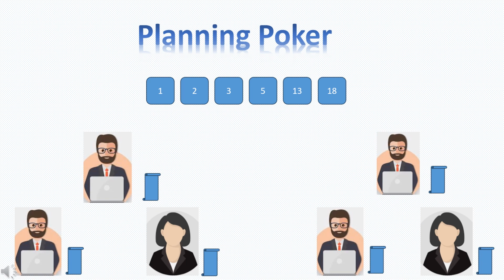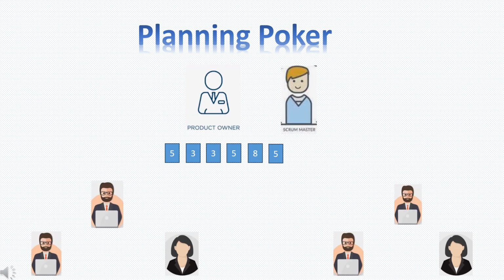If you know what that is, even some teams actually use the Fibonacci series. Here we are using an example of a common modified version. Now, if necessary, those numbers could actually be increased. You could have more cards that are larger, but that's actually uncommon. If you get stories that are too big in size, the team usually is going to want to break them into separate stories.